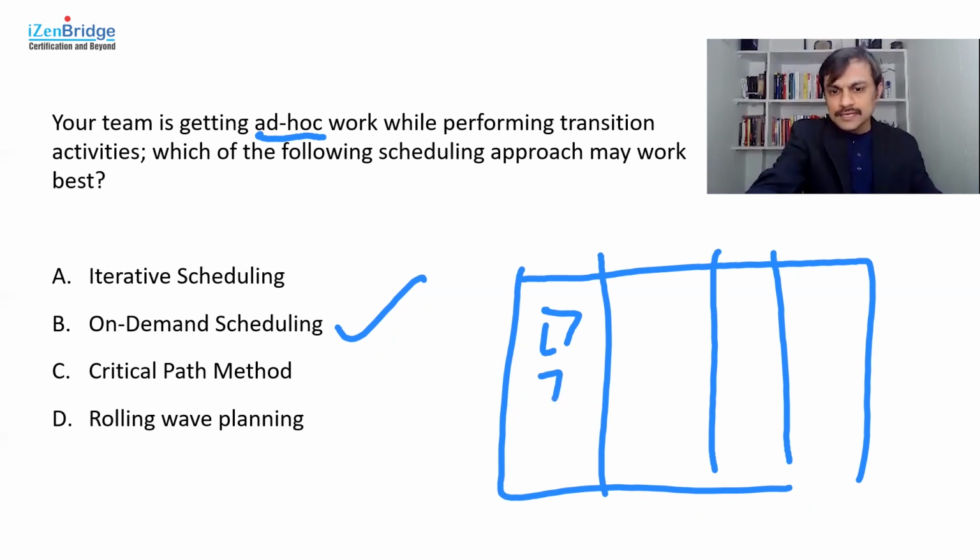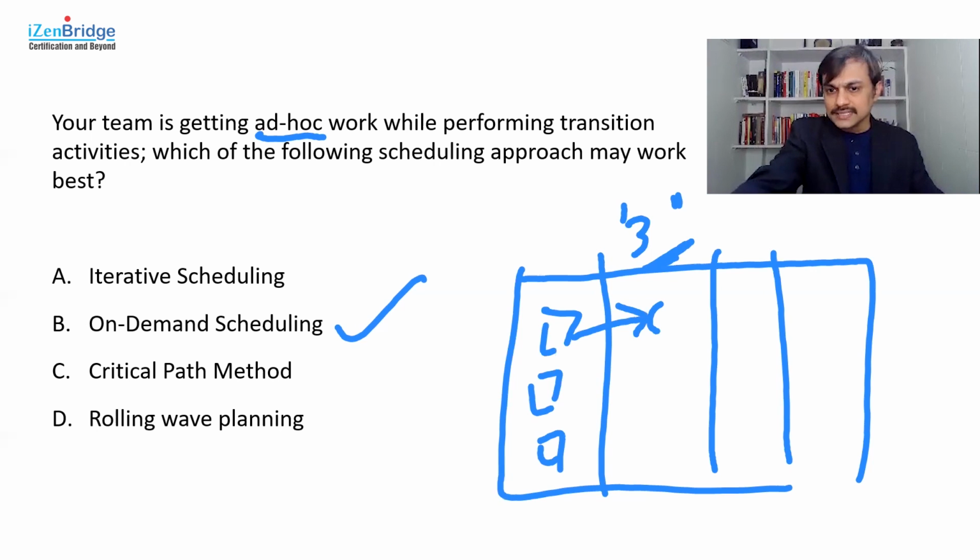So you have a mechanism where work is displayed. You have a mechanism to show how many items can be at this particular stage at a given point in time by putting work in progress limits. And whenever the capacity is available, the work moves to the next stage. And by doing it, we finish the work.